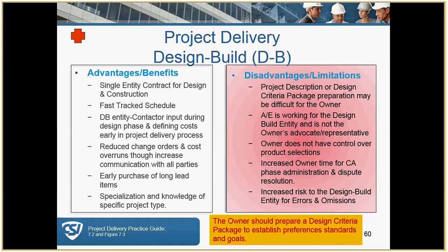And we've got disadvantages. In this case with design build, the owner prepares a design criteria package. And again, who prepares that package? It's the owner, to establish the preferences, standards, and goals. And again, it goes back to the fact of how well educated is your owner, what are their capabilities, do they truly understand what their design criteria needs to be without the assistance of a design team.